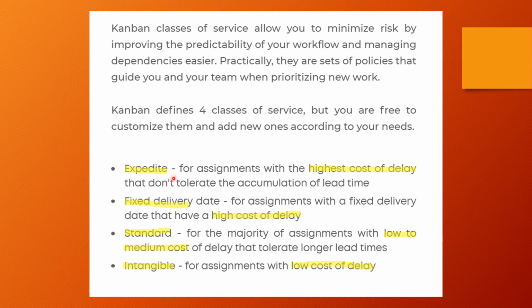Expedite is the first type of class of service, where the assignments have the highest cost of delay and don't tolerate accumulation of lead time. Something like the system is not working, there is a breakdown of the system, an outage. An outage of the system is very expedient.